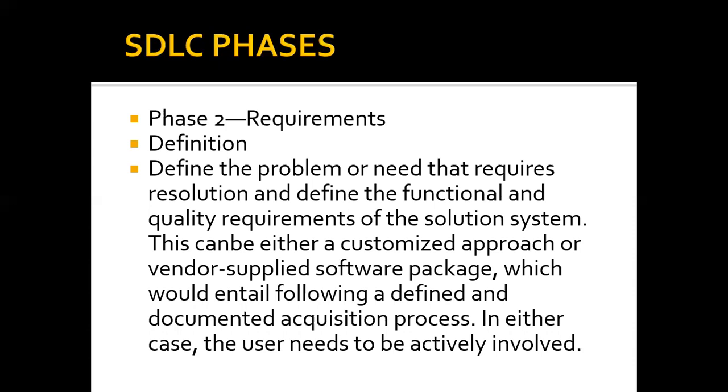To address scope creep, you need to do what is called baselining or freeze points. Baselining means you need to be able to freeze the requirements at a point in time. Maybe you can fix a date and say, okay, 24 December, this is it. All requirements documentation and validation cease.